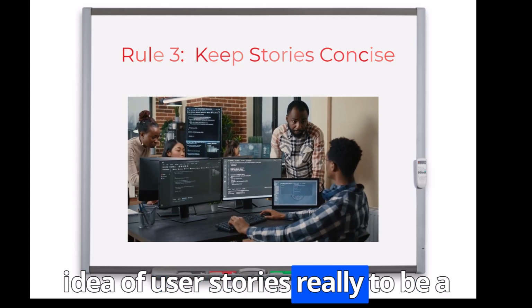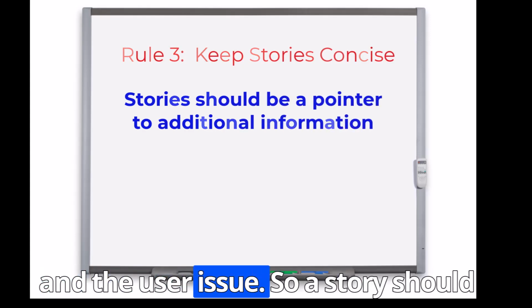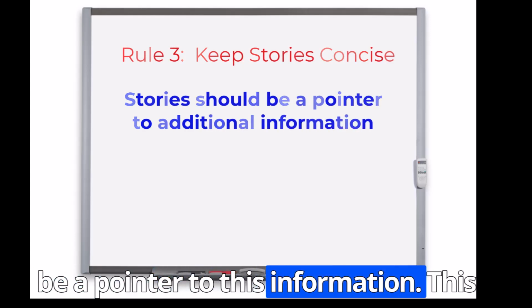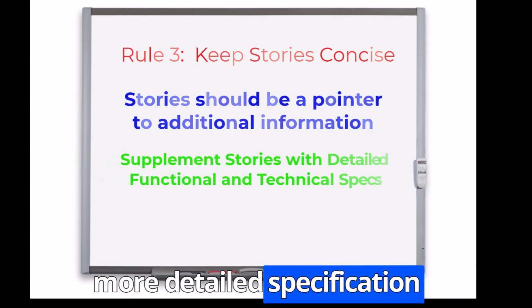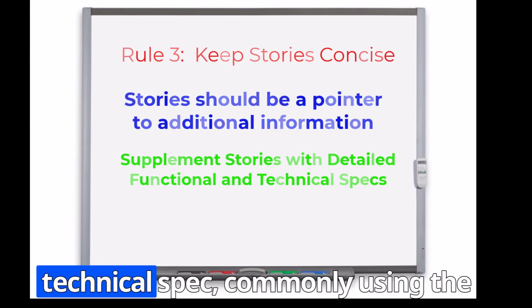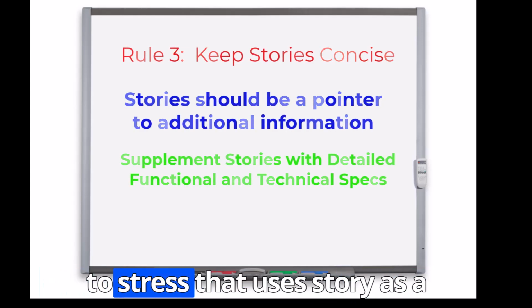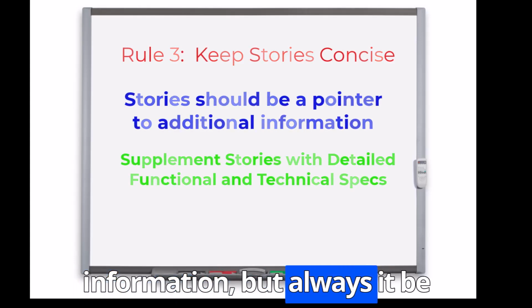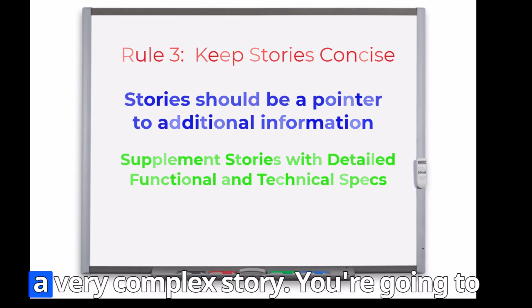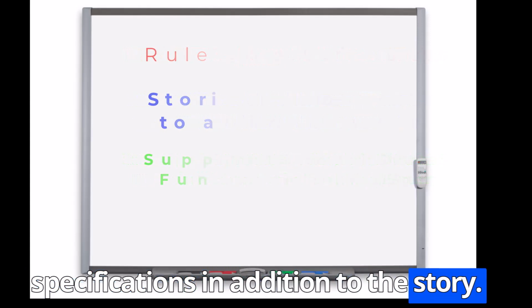And the idea of a user story is really to be a pointer, to summarize a requirement and the user issue. So stories should be a pointer to additional information. This should not be a replacement for your more detailed specification documents, such as functional and technical specs, commonly used in the SAP and ERP environments. So you want to stress that you use a story as a placeholder and to contain the information, but always be prepared to have links, especially for a very complex story. You're going to have functional and technical specifications in addition to the story.